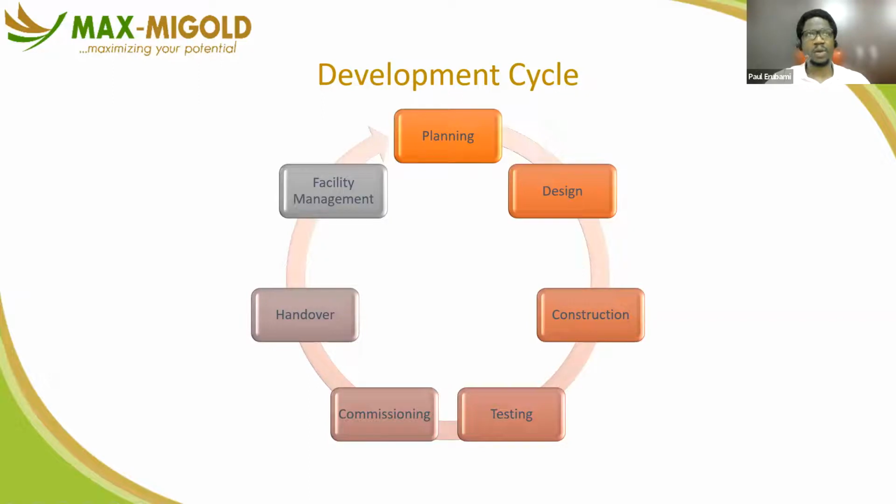So you can test that an air conditioner works in a room. That room is going to serve the purpose of a nightclub. People are going to be dancing there, right? The AC works. All testing parameters pass. But you can only commission it after the number of people designated to dance in that space actually dance. And you observe how they sweat, how many of them faint, how many of them could not dance because of the heat, whether they complained the place was too cold despite their activities, and so on and so forth. That's how you check for adequacy, right?